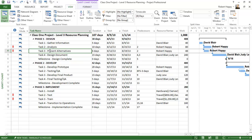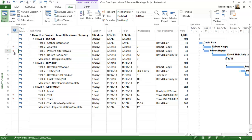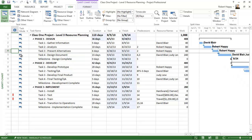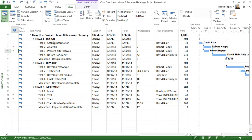Sometimes you can use some of the tools that Microsoft has to offer to automatically resolve these problems, and some of them are leveling tools. I already talked about the fact that you can right-click on this red stick figure and reschedule to the next available date, and that resolves the conflict. That's a nice quick fix because you're only really leveling that one particular task or moving that one task out based on the conflict.